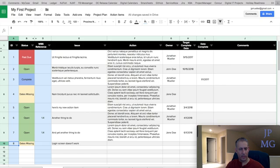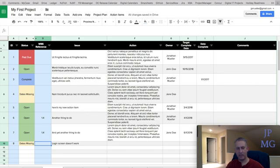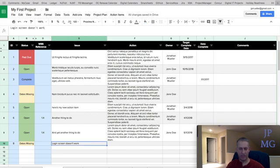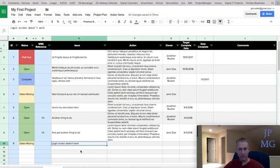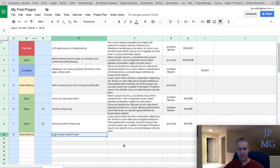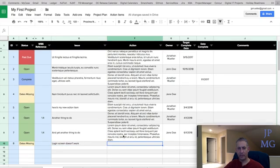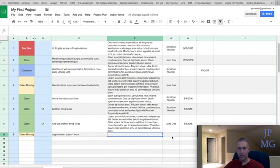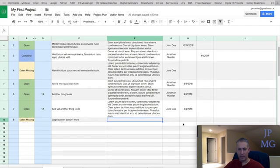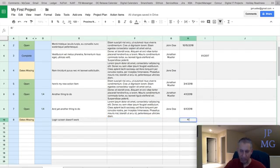So it has a unique ID and gives us something to focus in on when we discuss these things because a lot of times you like to reference these things by number. So issue is really going to be a very short description, whereas in the action is what are we going to do about this? Who is it assigned to? When do we expect it to be complete?